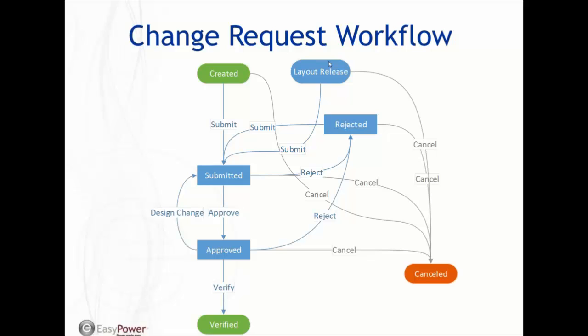We have another thing here called layout release. I won't get into it too much, but that's a way in which you can, in mass, outline several potential changes you have planned for your one line, but not formally implement them on the one line itself. So they won't affect any calculations yet, but you're effectively reserving points of connection for some sort of future layout release, so that viewers of the one line and viewers in ECCM can be aware of changes that are planned, but they won't be modifying the one line calculations just yet.